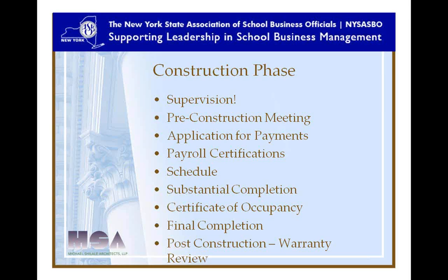Because if any of you have been through a construction project, it's completing that punch list that sometimes gives us all a few headaches. But final completion is when that punch list is ultimately complete. We make our final inspections and sign off on it. And then the last thing we would do is a post-construction inspection, which is really like a warranty review.